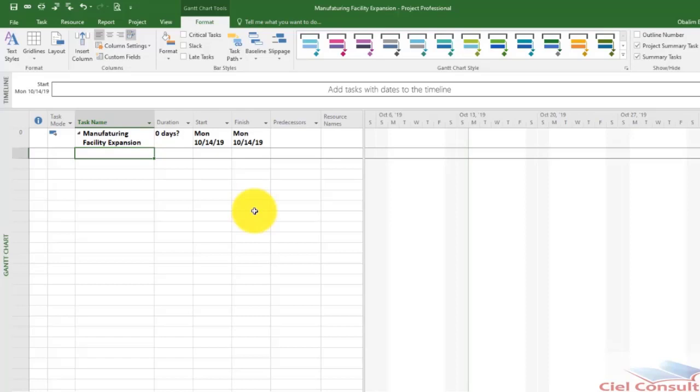But for your Microsoft Project, typically it's best you first of all create your work breakdown structure, then create your activities or your tasks. The exciting thing is that you can feed all of them in your table at once. So your level 1, your level 2, level 3 plans, as well as your level 4 plans, all of that can be fed into your Microsoft Project in one stretch.